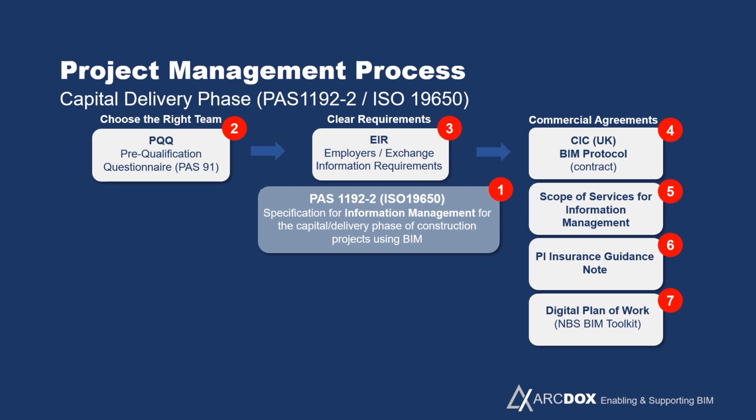There's a guidance note from the Construction Industry Council that basically says that everybody who carries PI or has design responsibility should let the insurance company know that they're participating on a BIM project. The next one there is you should assemble with your client a digital plan of work that describes how this digital model is going to come together over time. So you wouldn't attempt to build a physical building without a plan of work in place, and in the same way you shouldn't attempt to try and construct a digital building without a plan of work in place.